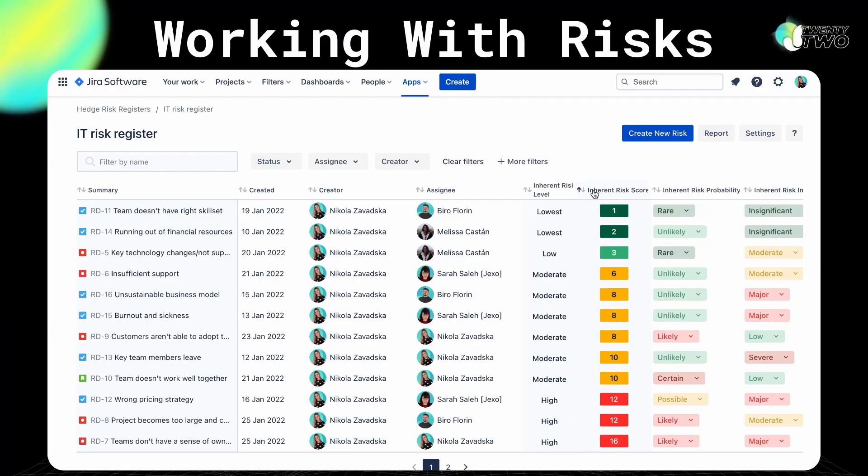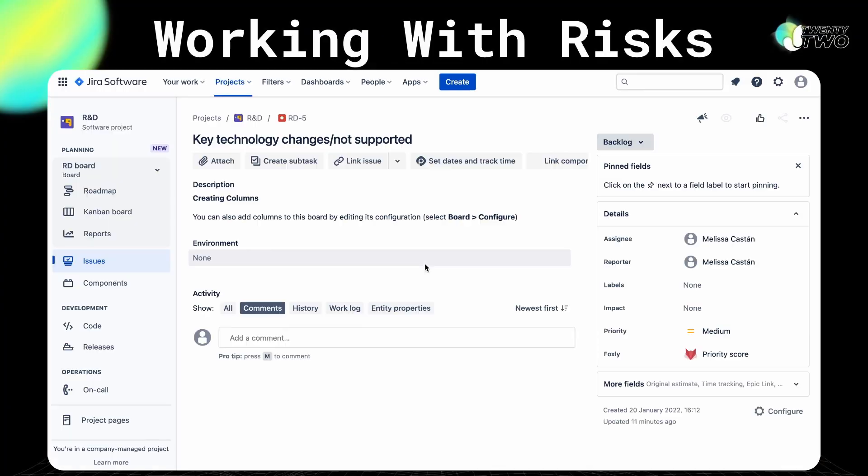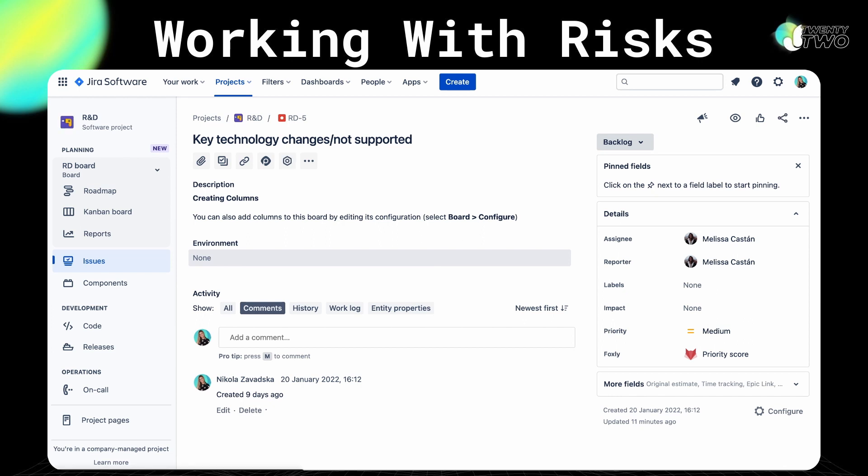Once you have set up your risk register, you'll be able to create all of the potential risks using the issue creation view in JIRA. Hedge uses the custom issue type so that when you generate a project risk register, the issue type 'risk' will be created in that specific project. This means you'll be able to create a risk the same way you would create a regular issue. You'll have easy access to risk from any place on your screen, including Swanly and Foxly if you use our other apps.